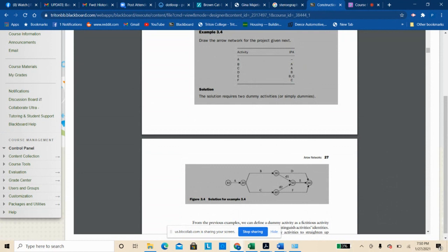So if you've got activity and precedence as shown in example 3, 4, your goal is to have no dummy task if you don't have to. When you realize that, yeah, I do need something to differentiate, you put in one dummy task and see if that takes care of the problem. If it still has a precedence problem and the path is still the same from X to Y, whatever, then you add dummy tasks as needed to try to create unique paths for all the options.